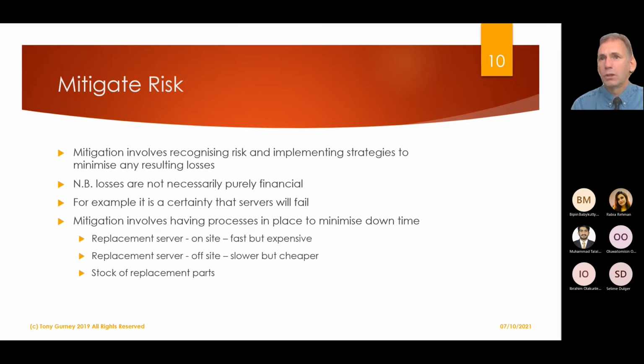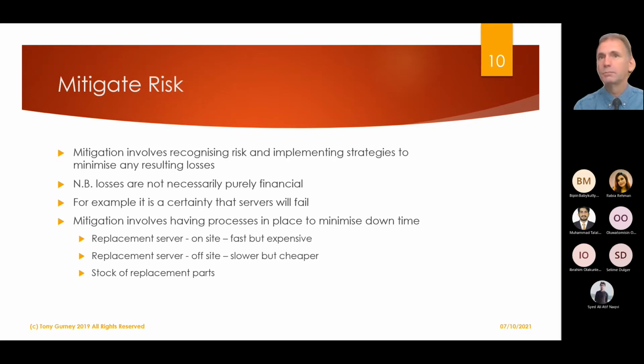For some organizations, that might be okay. For some organizations, they might just go in and say, yeah, okay, we'll do other stuff then. But for other organizations that are reliant on the server, that might not be feasible. So instead of having parts, you might have a whole replacement server sitting there. And if anything goes wrong, you swap out the server for the other one.